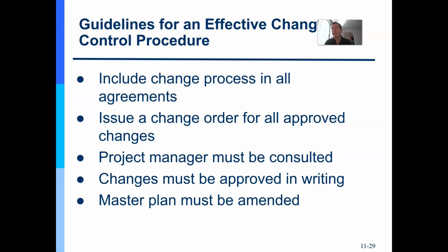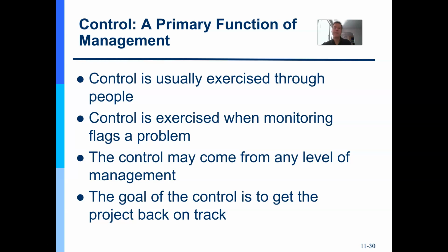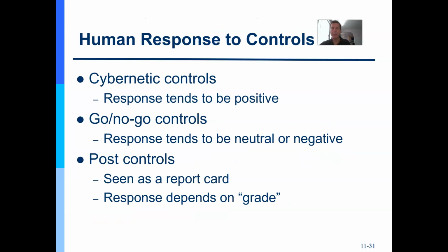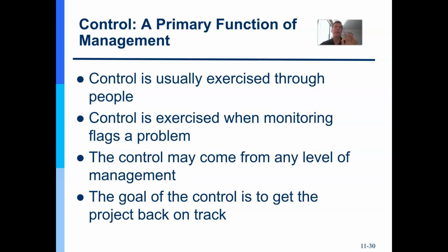Yes, the project manager must be consulted because you should be on the change board. It's your board that you are running, okay? Do it in writing, and like I said, have a change control log to record everything. This becomes a primary function of management, you as the project manager being central to it. And you want to proactively identify an issue and bring it to the change board in advance, right? So you could do a change board for actual deviations, true, or for anticipated deviations as well. And you'd also do a change board whenever you have defect repair. So in those 3 times, you definitely want to have a change board stand up. I used to do them monthly and also then by emergency use.